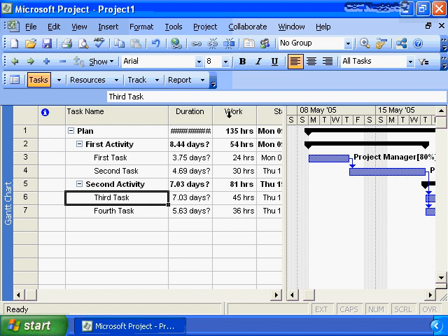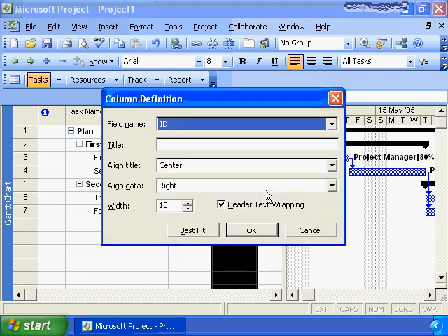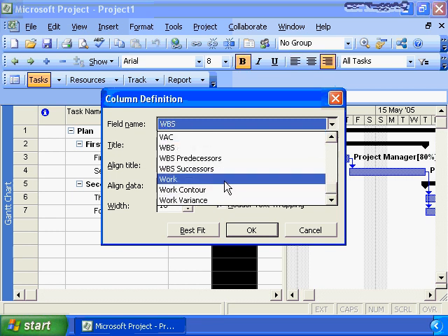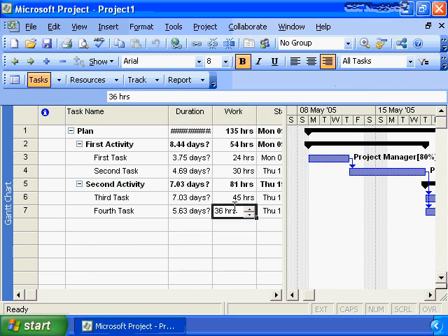And I focus on this particular component of how we got that work column in there because that is not available in the standard view from Microsoft Project. So you need to understand that you do the right mouse click, you do an insert column, you select the new column you want, which will be work, and you enter it into your Microsoft Project Gantt view. Once we had that in place, when we tried leveling our project plan, we got some unrealistic results. So then we went in and we added the appropriate dependencies to ensure that the work was being done in the order that we required the project to be delivered.